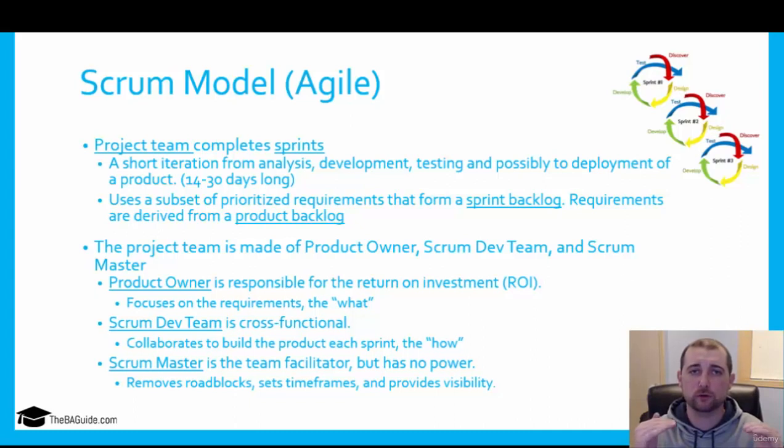The product owner is responsible for the return on investment. They're ultimately the ones whose head will roll if the product doesn't meet the needs of the business. They're the ones bringing the business need forward. They're prioritizing those requirements, and they're determining the what. They're ultimately filling that product backlog with all the requirements and needs of the business. So they're usually a business user that's being brought in, usually a subject matter expert or somebody up in senior management, somebody that has a very good grasp on what the business wants and needs out of this particular software.